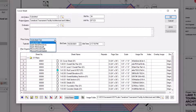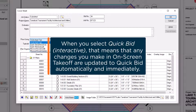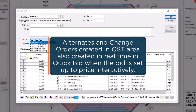If you select QuickBid Interactive, that indicates that you want changes made to your takeoff in OST to update automatically and immediately to QuickBid. Essentially, any change you make in OST is reflected in QuickBid in real-time. Additionally, if you create alternates or change orders for this bid in OST, they are likewise created and ready for pricing in QuickBid. This is recommended for most users.